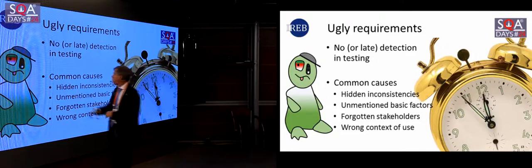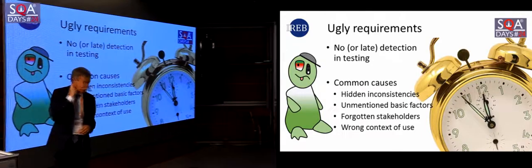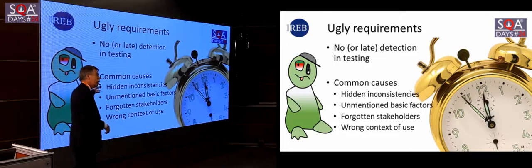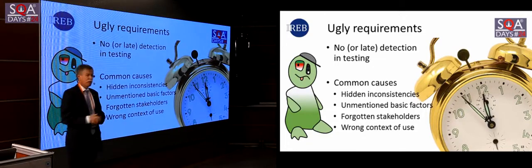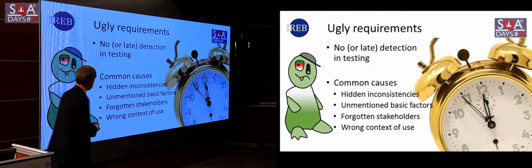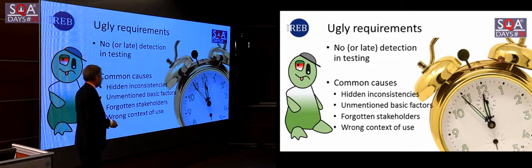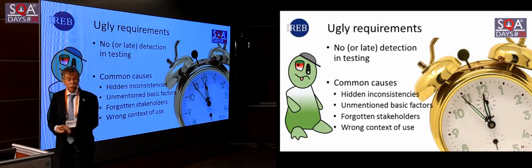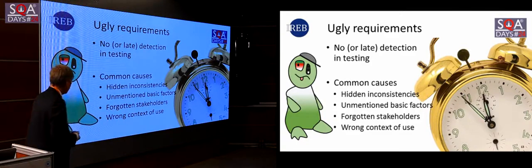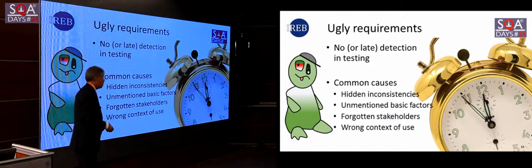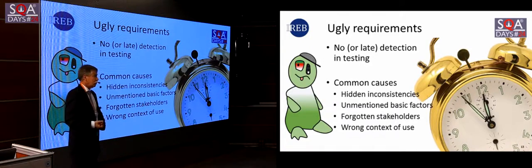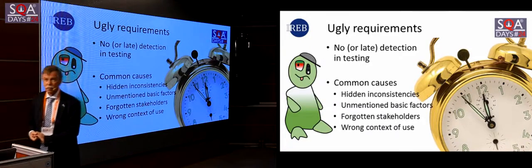I think common causes are these 4. First, the hidden inconsistencies, especially for non-functionals. Unmentioned basic factors. You really need domain knowledge to capture them. Forgotten stakeholders. It occurs much more than you would think. And not understanding the real context of use.